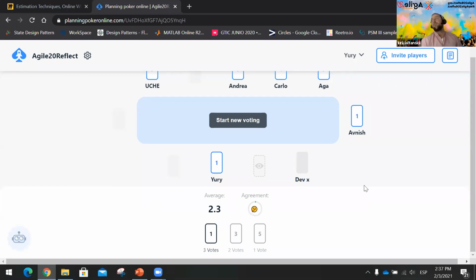Well, let's see. If we do all the stuff according to the Scrum guide, we have, let's say, 4 hours for sprint planning, and 7 to 9 persons in the team. It depends, because the first planning would most likely be the most complicated.